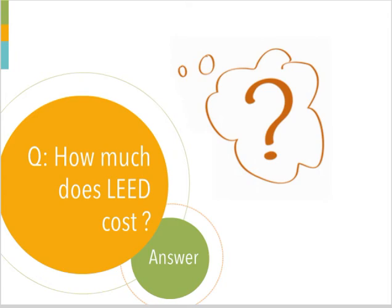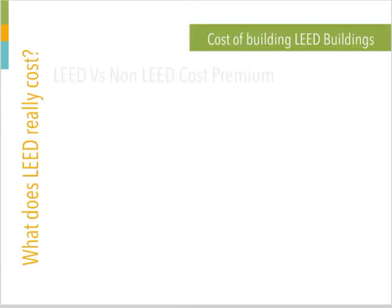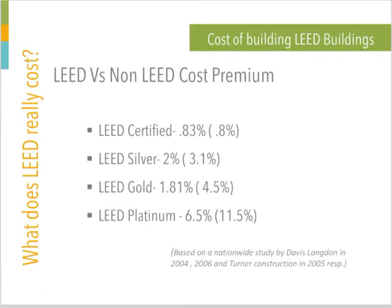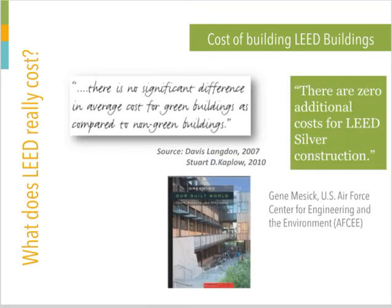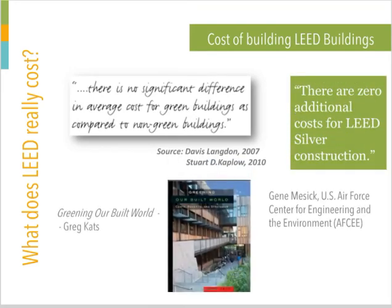Now that we went over the performance of green buildings, as construction professionals you may wonder: how much does LEED actually cost? Because frankly, it always comes down to the dollars, doesn't it? There is a lot of uninformed talk about the cost of LEED — that it's too prohibitive, etc. It is true that there are costs associated with pursuing LEED certification, but they aren't very much. This slide shows the average cost differential for the certification levels. Stuart D. Kaplow states in his June 2010 white paper: there is no statistically significant difference in construction costs between LEED and non-LEED buildings.